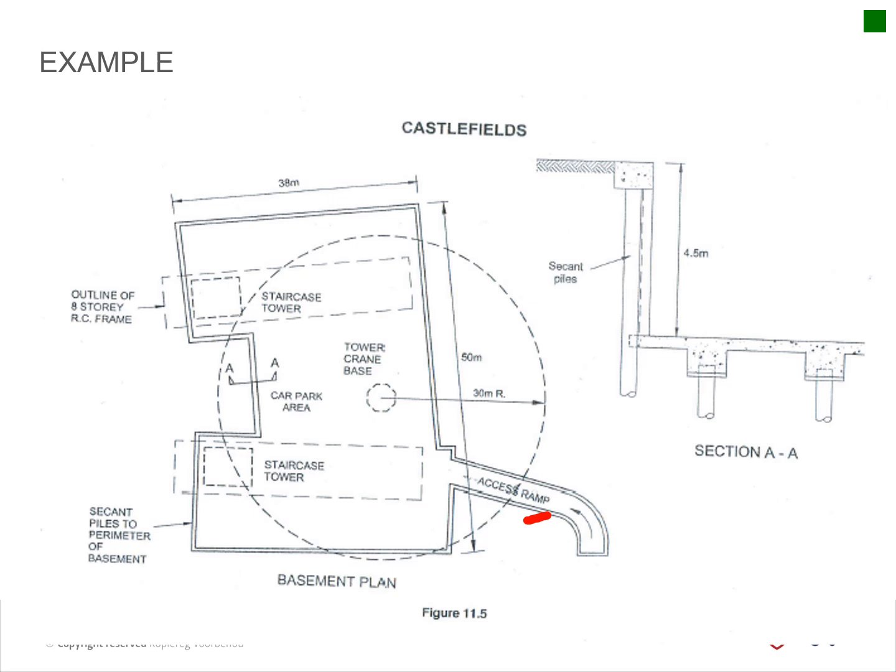And then they combine the health and safety within this method statement. So you can see significant hazards, and then you've got control measures. So there's the health and safety section incorporated, and then they've got their PPE there at the bottom. Okay, I think it's fairly straightforward. Questions to that far?